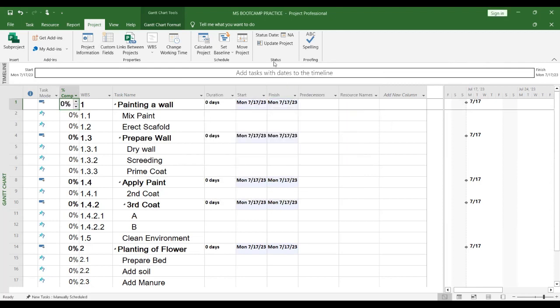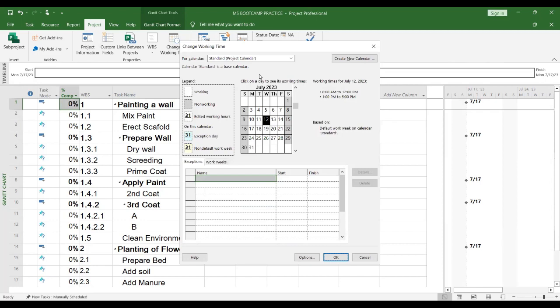Then you can also go and, for example, the time you are doing duration, maybe there's salary break, there's Christmas break. In this setting, you can go and change your working time. Can you see this dialog box? You can go and introduce public holidays there.